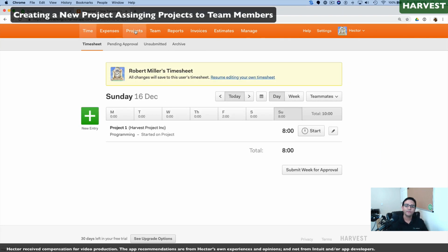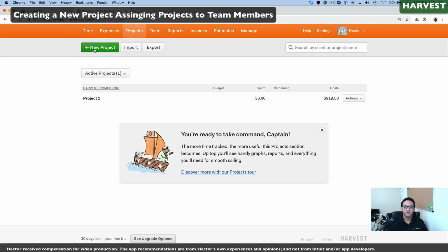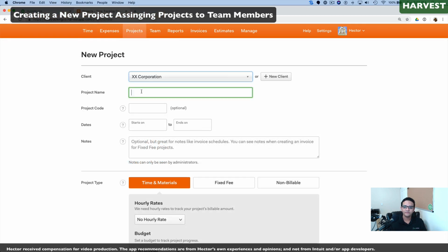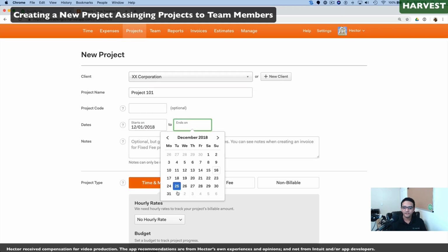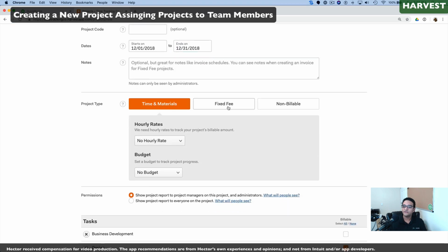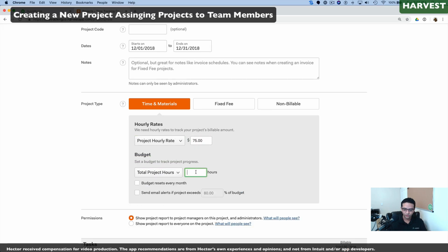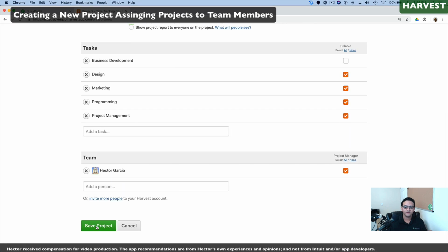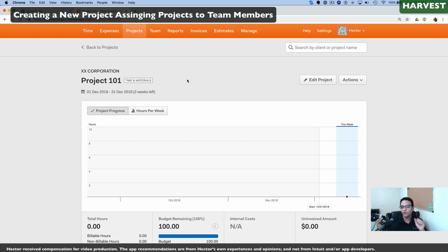Let's go ahead and create a new project. I'm going to click on Projects, click on New Project, select my current client from the client list, and we'll call this one Project 101. We'll select the date range for this project. I will select whether this is going to be a fixed fee project or a time and materials project. I'm going to go ahead and select an hourly rate of $75 an hour, and I'll select a budget of a total of 100 hours. Then I'm going to scroll down and click on Save Project. Right, my Project 101 is created.